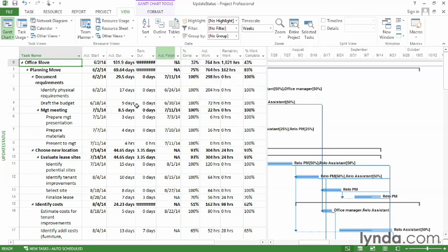Well, the first column after the task name is Actual Start. And that makes sense because when you start to update tasks, the very first thing you're going to put in is the actual start date. But then after that, the next two fields are Actual Duration and Remaining Duration. And that's an easy way to update tasks. Basically, you say how much duration has been done and how much is left to do. You can also use % complete and remaining duration because it calculates the same things.